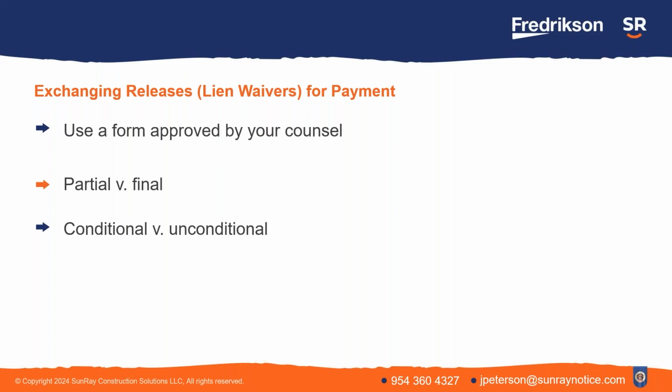Basically, in Minnesota, regardless of the language of your form, all lien waivers in Minnesota are conditional. What does that mean? It means it's conditioned on you getting paid. So if you give a lien waiver and you haven't been paid, the waiver is not effective. The waiver is not actually effective unless and until you've been paid. So that distinction in Minnesota is not entirely important because the law is what it is, but it's important to make sure that you're giving lien waivers that say on the document that this lien waiver is only effective once you receive payment. And if you don't receive payment, it's not effective.